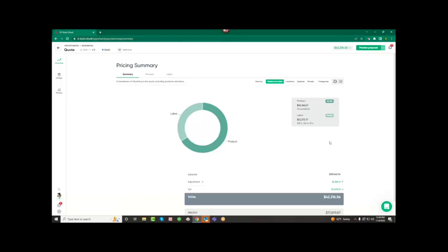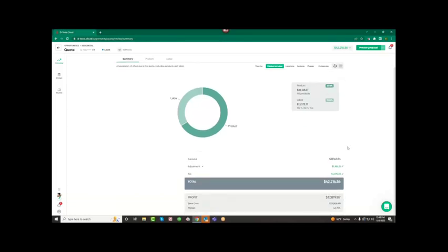And what does that do for us, right? So now we're at, what is that, 33, 34, roughly? Yeah, so we're getting closer. And then you're always going to have a gut check moment, right? And that gut check moment is, hey, is this an average size job? Can I sell it for this price? And if so, let's do it. Let's get out there, because chances are this job is probably going to take more like 132 hours, which is what we're bidding, versus the 100 hours that we were bidding before, right? And this gets us a lot closer. Now that notched up our margin a little bit to 43%.